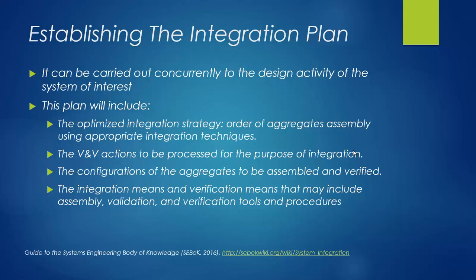So in the plan, we have to state our strategy, the order of the assembly, and what kind of techniques or mix of techniques are going to be used. In addition, in the plan, we need to include the verification and validation actions to be processed for the purpose of integration.